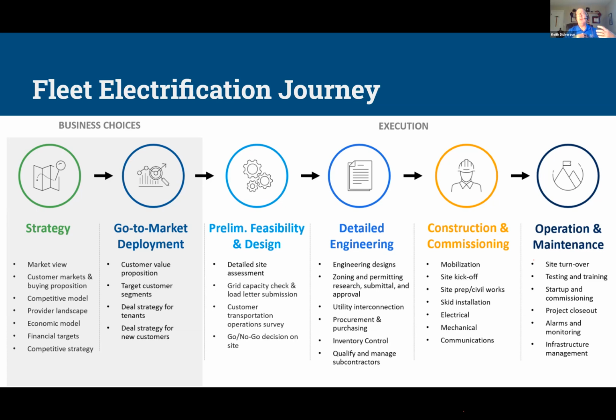And I think from a bus perspective, having the clean elements of electric buses is probably the thing that people want first, but you have to pay for it. So understanding that strategy, using innovative procurement vehicles, like what Highland does, and I'm not here to promote Highland, but they have a good business model. It's called transportation as a service. So you're bringing in the infrastructure, you're bringing in the vehicles, and to David's point, you're doing it generally in a revenue neutral type of format. So that's incredibly important.